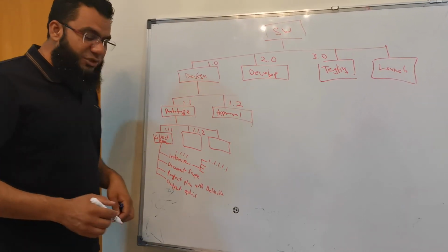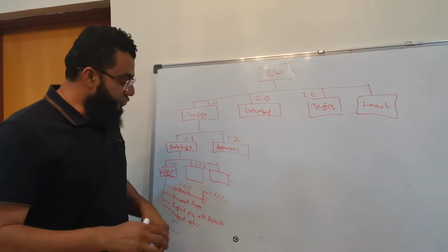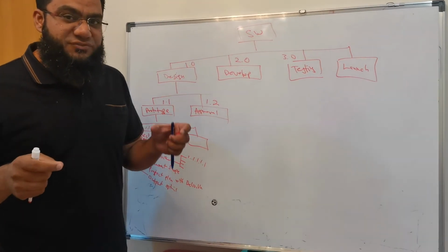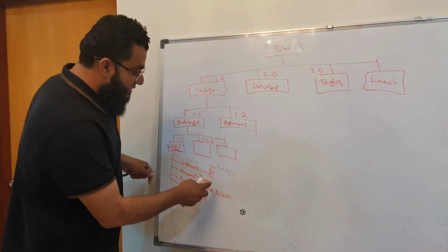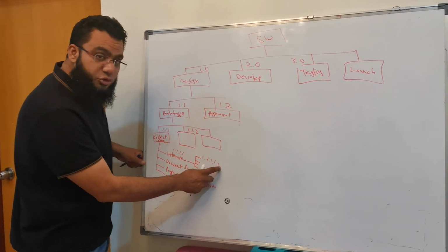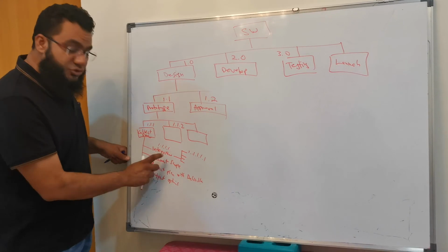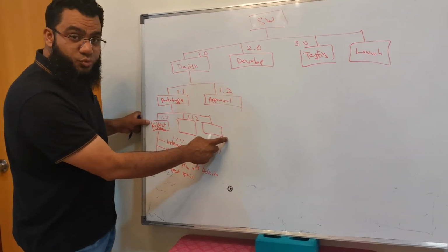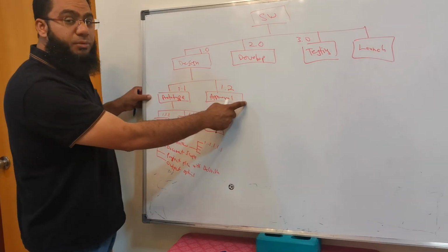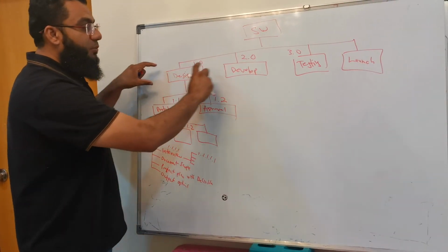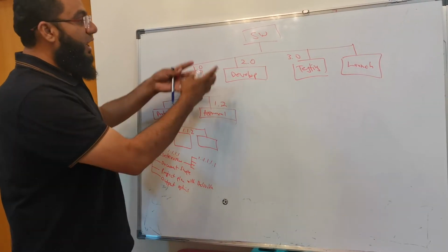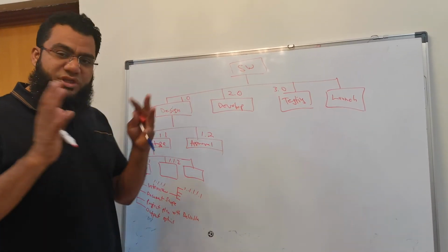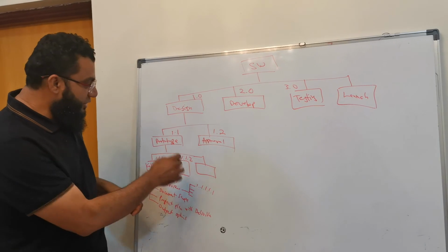Now you need to link, remember, code accounts. These IDs will be linked with the code account, so we know if this activity has been paid, and we can sum up how much these sub activities are going to cost, how much the work packages are going to cost, what the cost of these deliverables is, and how much each phase is going to cost. That way I can know the time and cost of my overall project. I just want to give you an idea of what happens if you simply divide your activities like this.